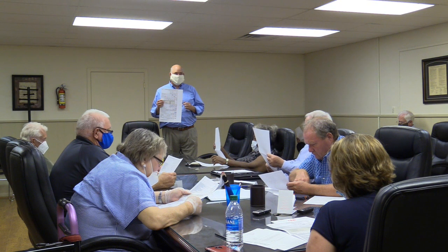It's confusing because a lot of stuff is shifting around. Whereas before, we were planning on some things at the top end of the budget, now it's down here. So I apologize for that part, but we're just doing that as a way to sort of compare apples to apples. Further, if you see the colored cells, if you're seeing a cell that's light blue, that's a cost that we know is not going to fluctuate. So in general terms, the more blue you see, the better, because it's pinned down. All these budgets are moving targets. If it is a yellow cell, that's a number that we know is true. It's not a budget number, it's an actual figure, but we expect it will fluctuate. So we are beginning to pin things down over time as things develop.